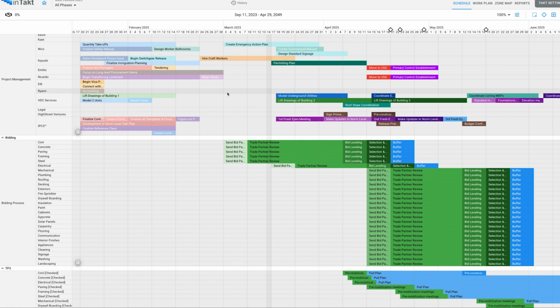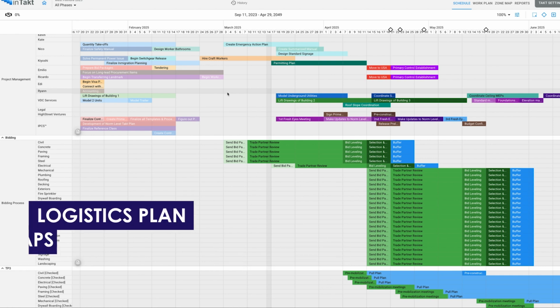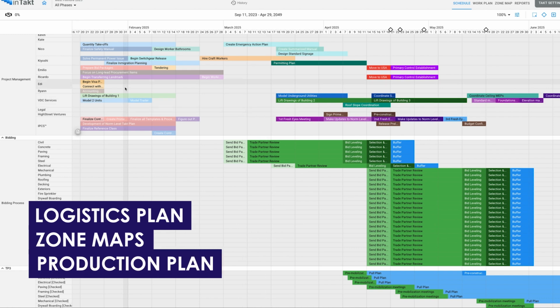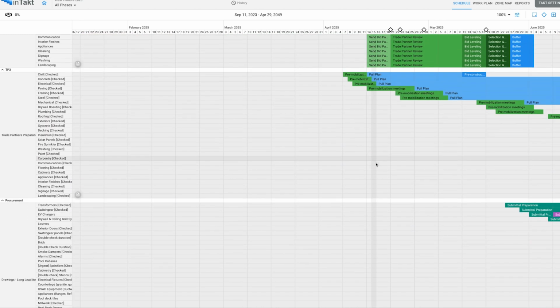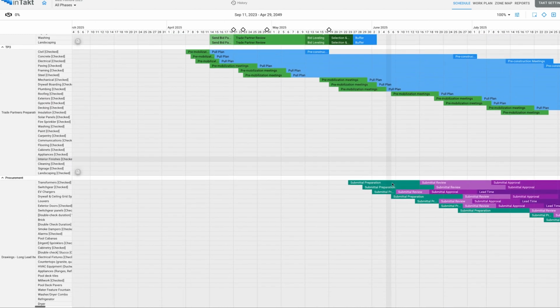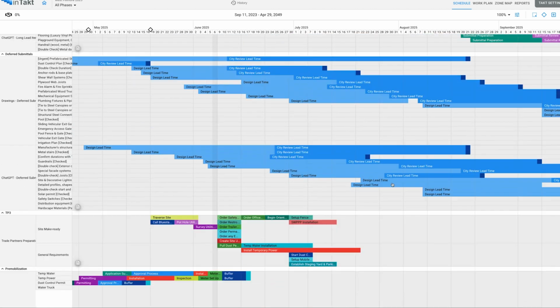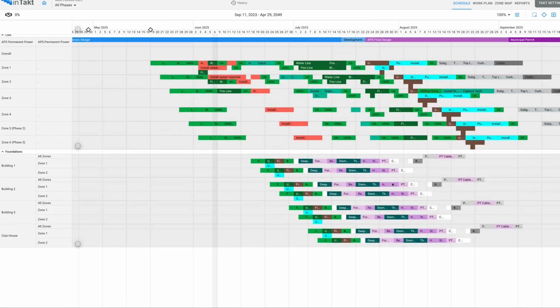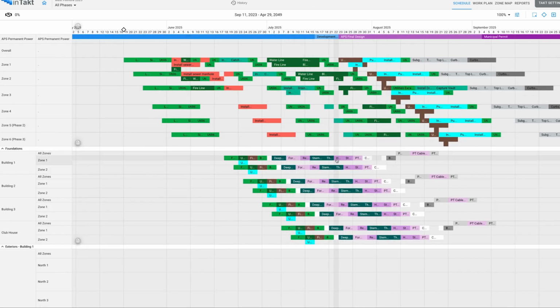But let me just finish by saying you need to have logistics plans and zone maps and a production plan that has the right make-ready activity, the buyout, the trade partner preparation process, your material procurement, your deferred submittals, any other timelines, so that you can actually start your production plan on time and finish with buffers to cover your risks ahead of your substantial completion.